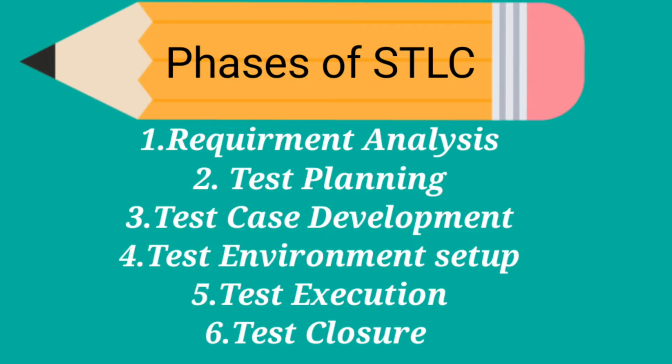The activities that take place during the test planning stage include identifying the testing objective and scope, developing a test strategy, selecting the testing methods and techniques that will be used, identifying the testing environment and resources needed, identifying the test cases that will be executed and the test data that will be used, estimating the time and cost requirements for testing, identifying the test deliverables and milestones, assigning roles and responsibilities to the testing team, then reviewing and approving